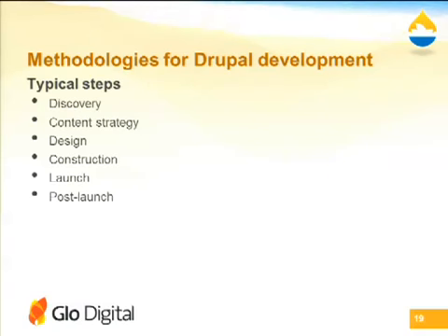Okay, so design. Construction will be building the site. That's what most people here actually know something about. Launching it, setting up database server, CDN potentially, deployment, documentation, training, go live, etc. And post-launch stuff, which is a gamut, a variety of things, including promotional activities, a support and maintenance contract, or SLA, a review of both the project process and the outcomes, measure the outcomes, metrics, and potentially continued education as well.